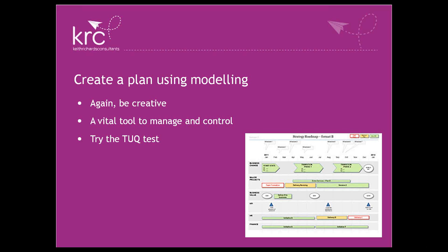So if somebody handed you a plan and said, this is where it is, how quickly could you actually understand the status of the project? And I'm literally saying, could you be completely familiar with every bit of information on that piece of paper within 10 seconds? Because if you're not, and you have to decode it, then this is not good from the point of view of your project and overall control.